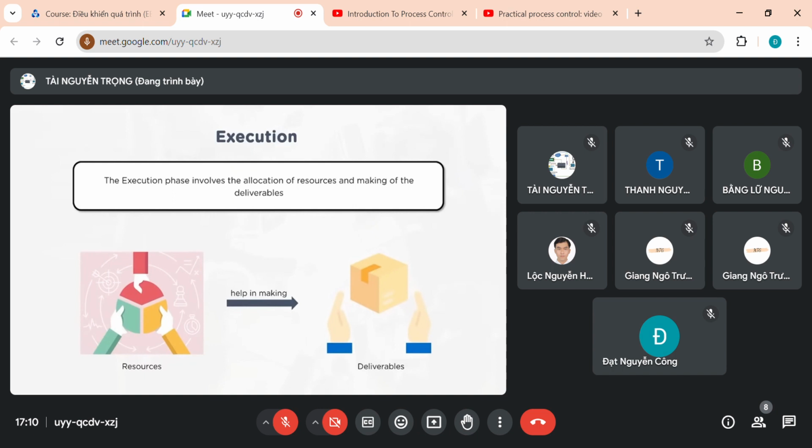So during monitoring, one may find a deviation. During monitoring, the project may also be running the way it is required. So this monitoring phase involves action from the project manager to monitor and control the work of the project. So comparing with the blueprint of the plan, what is accomplished, what was created during the planning phase of this project, and as the execution happens, monitoring and control is checking whether the activities being done are according to the plan or not.